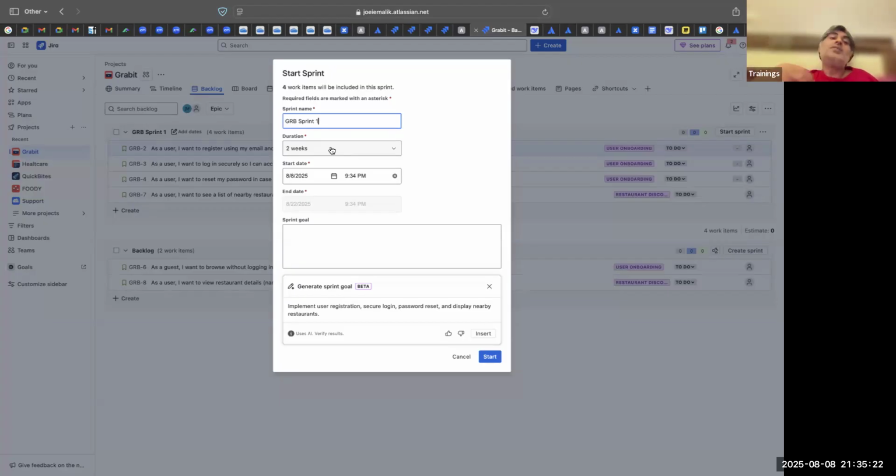If it takes 20 days, it could be a 4-week sprint. It depends on what the team is comfortable with, what their typical development cycle is. Don't be obsessed with a 2-week sprint. Typically, it should be a 2-week sprint, because more than that, it is very difficult to keep the priorities. Somebody will come and give some other priority work. So typically it should be 2 weeks.